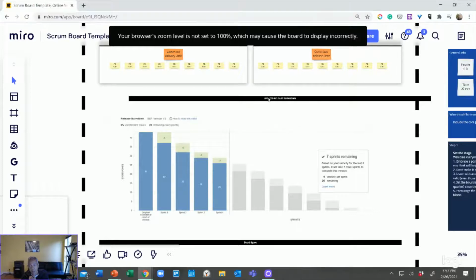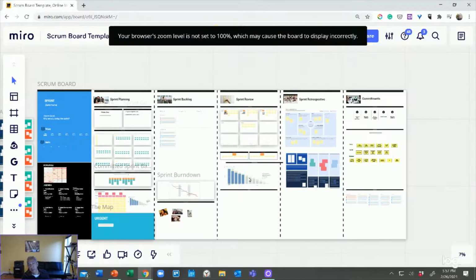The updated release burn down is giving you the opportunity to update it based on these days. So now you have where you were and where you are. Remember that this is meant to be throughout the course of a sprint. So you might have a 2-week period here. You might have a 3-week period. You might have a shorter period, but it is not something that you update on a single day for the most part, right? It is something that you use as your guiding information radiator and artifact holder that the team can huddle around.